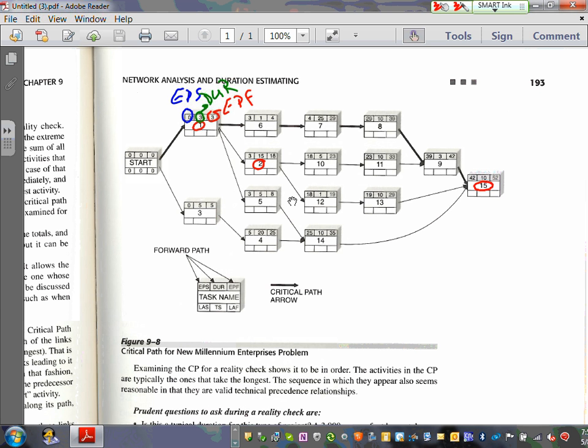Any comments, guys? Any questions? I know it sounds complicated, but all these are activities, Adam. So in order to do activity number 2, you have to do activity number 1. For us, like a project, you have to meet with the customers before you start. Activity number 1 will be meeting with the customers. Activity number 2, coming up with the sketch for your project, right?